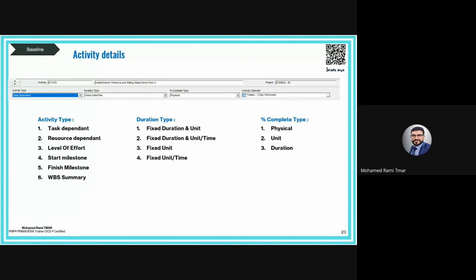Issue for internal cross check is 60%. Issue for approval to the client, we will earn 80%. Approved, it's 100%, for example. These rules of credit are very well defined in the progress measurement system and in the schedule management plan, and it's part of the PQP and PMP of the project, of course.